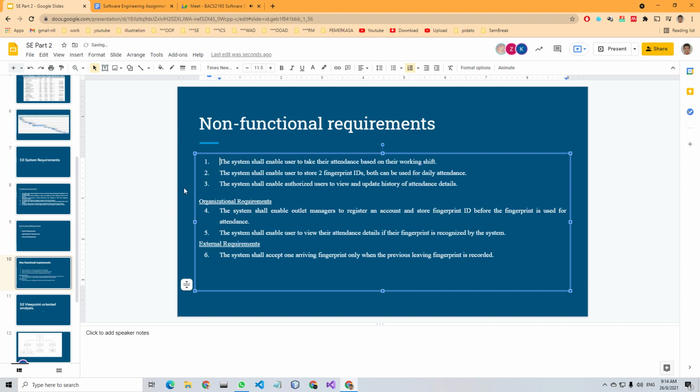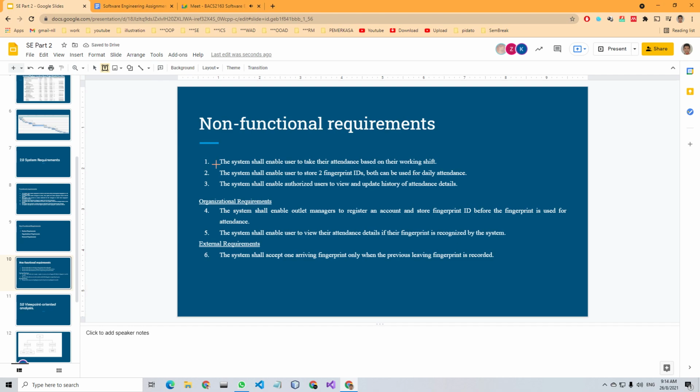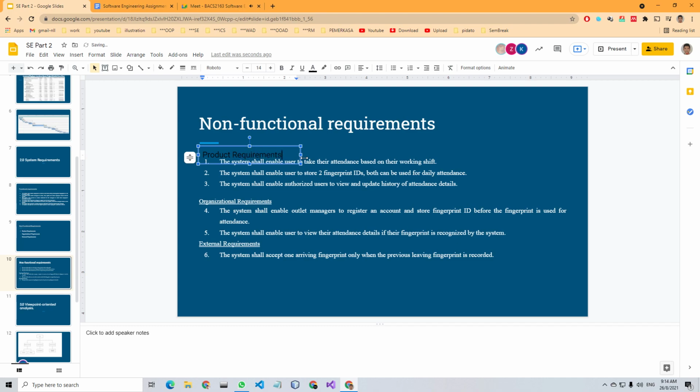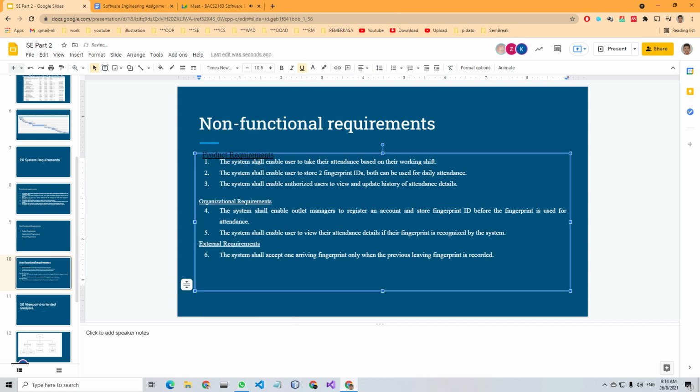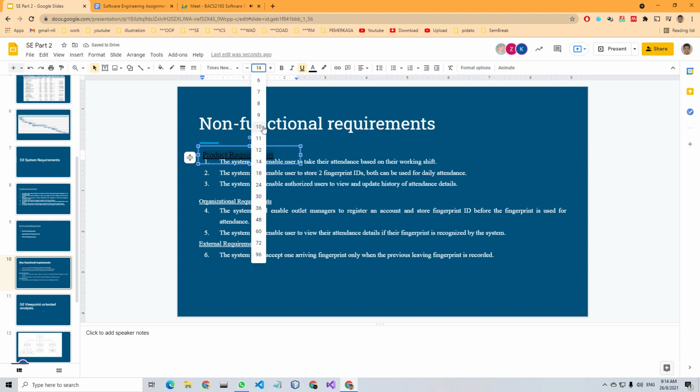After all the 5 modules are done, there will be module integration, followed by system testing, and then we will deploy the system, with some maintenance, followed by support, and then we have a closing meeting where we gather system feedback.